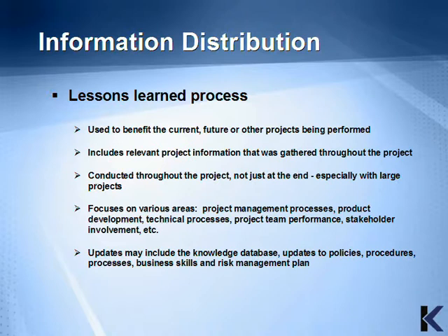And lastly, we have the lessons learned process. It's used to benefit the current, future, or any other projects being performed in an organization. It includes relevant project information that was gathered throughout the project. And it's conducted throughout the project, not just at the end, especially with large projects.